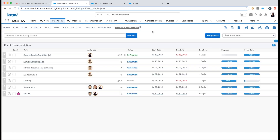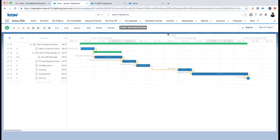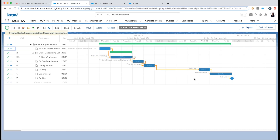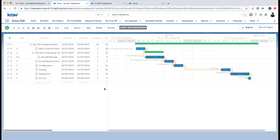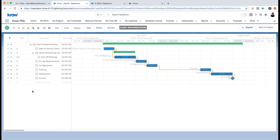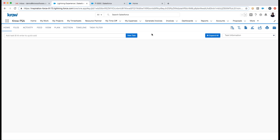As expected for a project, I can manage from a Gantt chart — tracking all dependencies, predecessors, and lag days. I can drag and drop to move out the project, add any number of fields, inline edit, add new tasks right from here, and export to PDF, PNG, CSV, or MS Project. You can also import from MS Project as well.